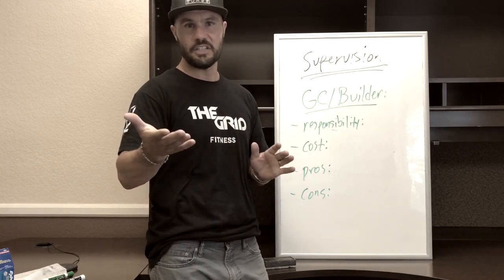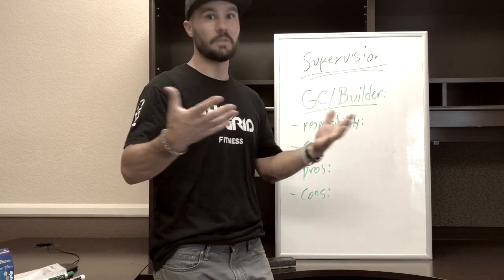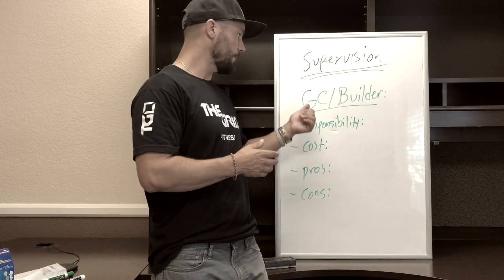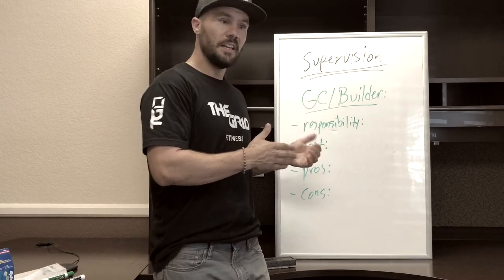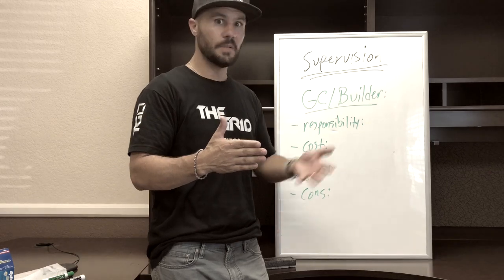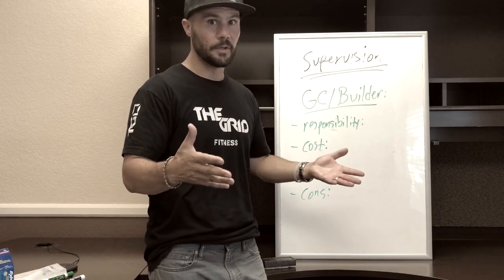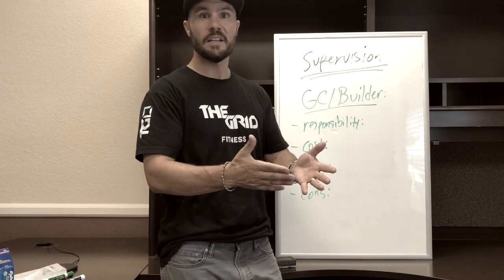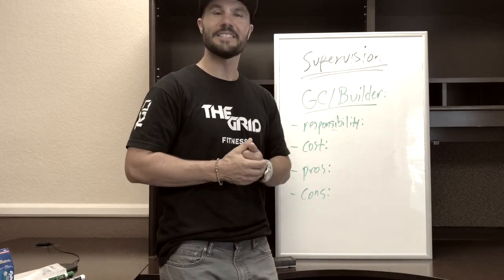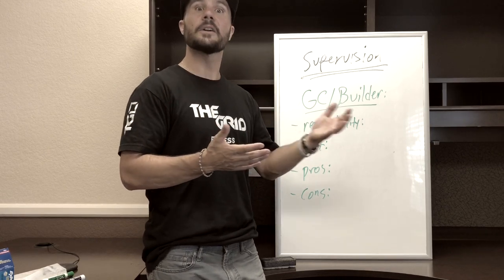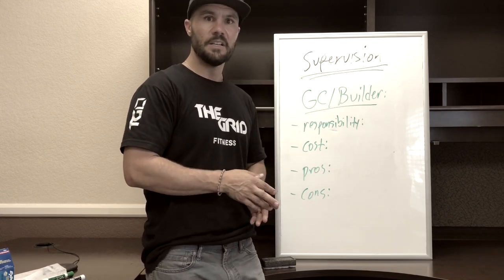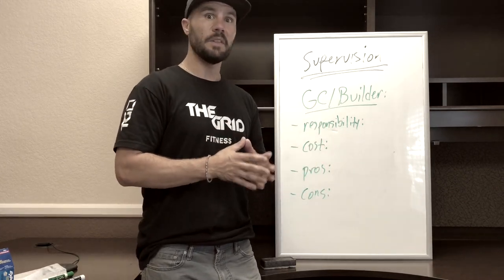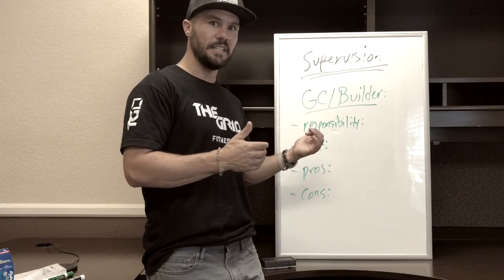Now in new construction and really in building, generally speaking, you'll hear the phrase cost plus. Now what that means is their fee to do your project is whatever the cost is for the subs and materials, contract and labor, right? Labor and materials. It's cost plus either a 10 or 15% is typically the number on their fee for managing that project. So if I'm doing a $50,000 rehab and I've got a cost plus 10, it would be the cost plus $5,000 for that GC to manage that.